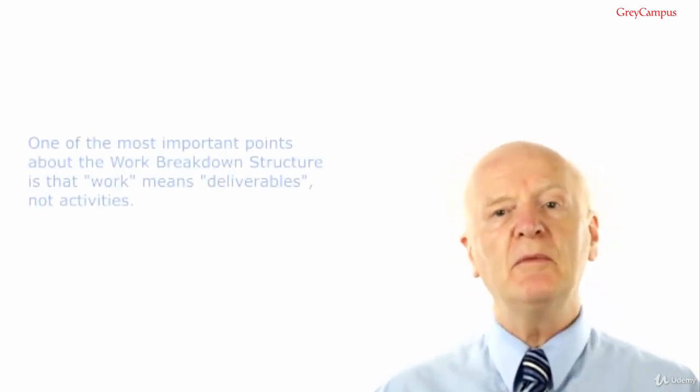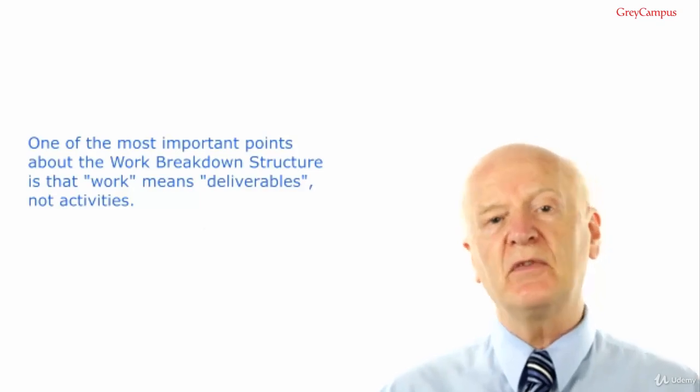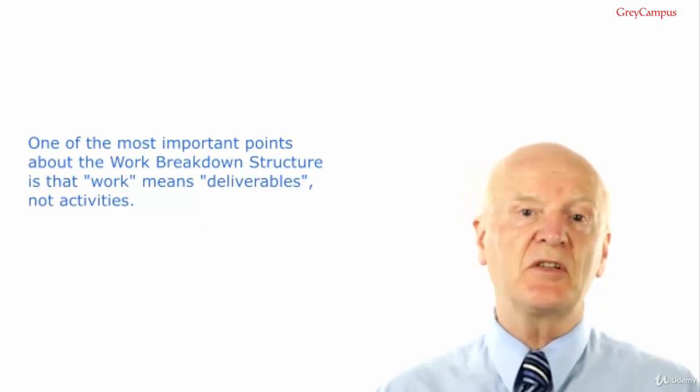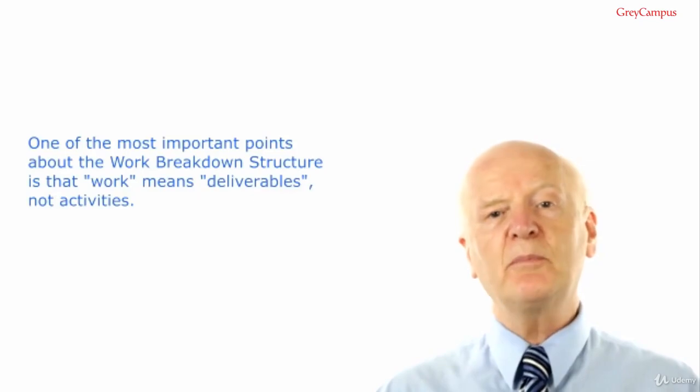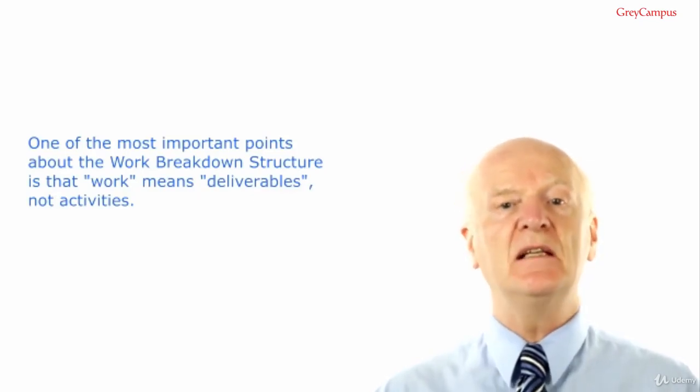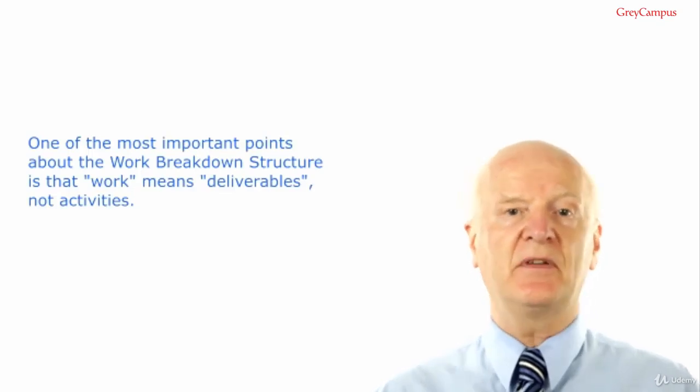A work breakdown structure is a very useful tool and vitally important on all but really small projects. But when I first heard of a work breakdown structure, the name confused me, because work sounds like doing things like activities. I'm going to work today. But one of the most important points, and listen very carefully, about the work breakdown structure is that work in a work breakdown structure means deliverables, not activities.